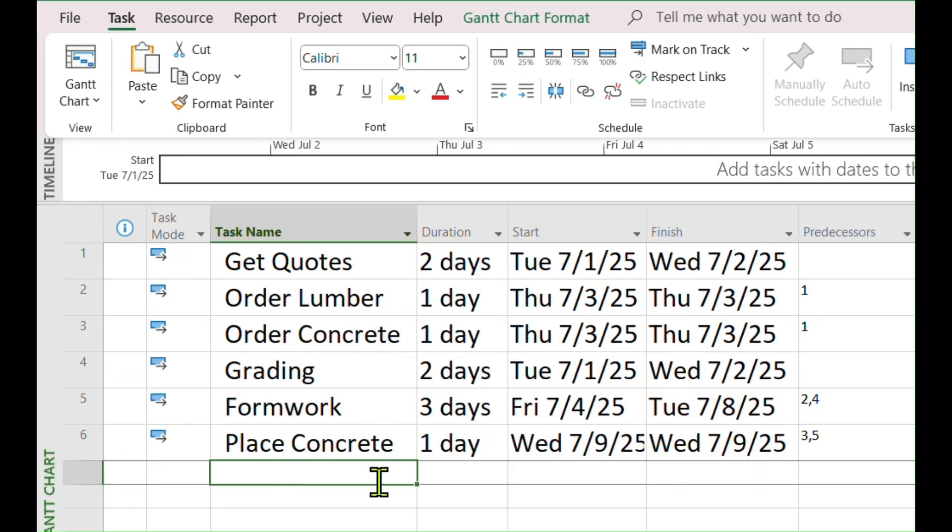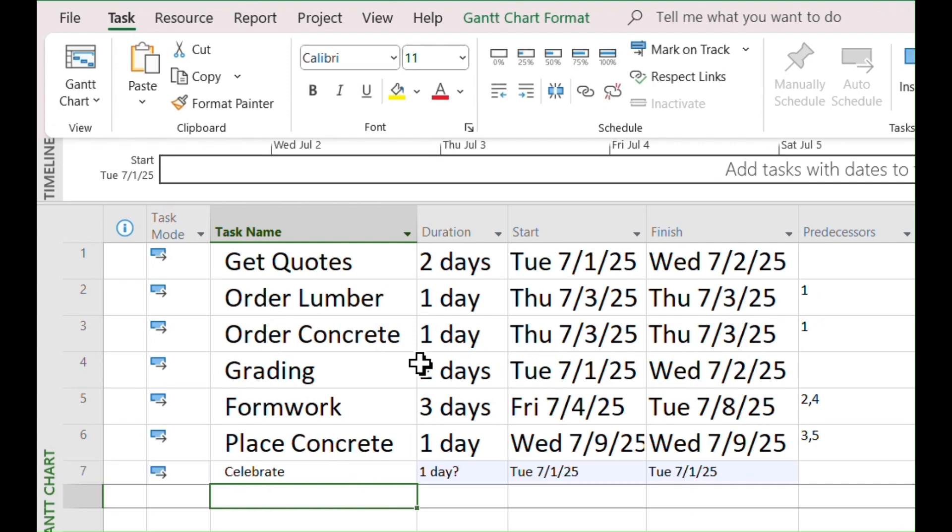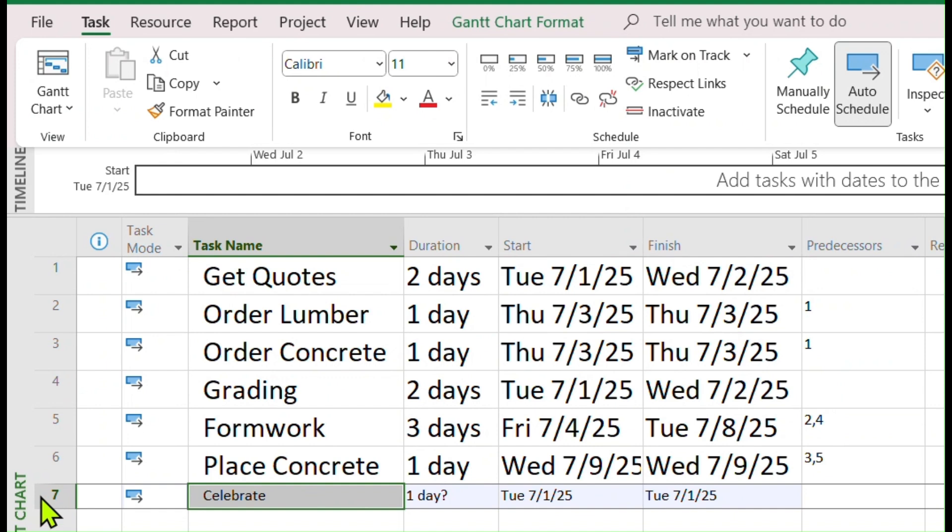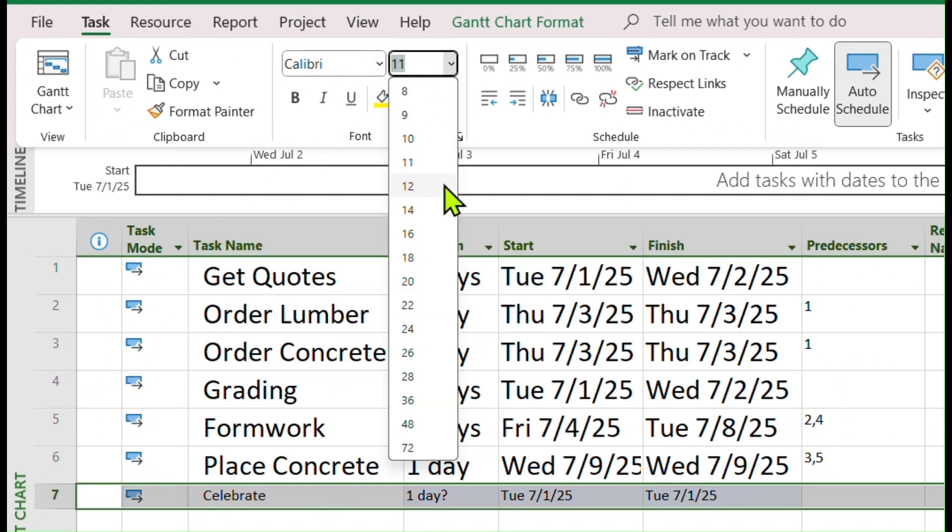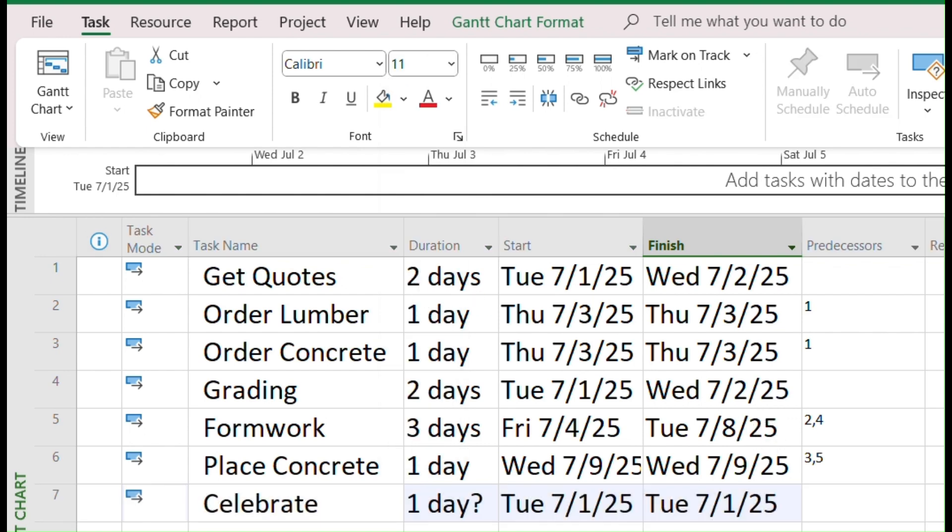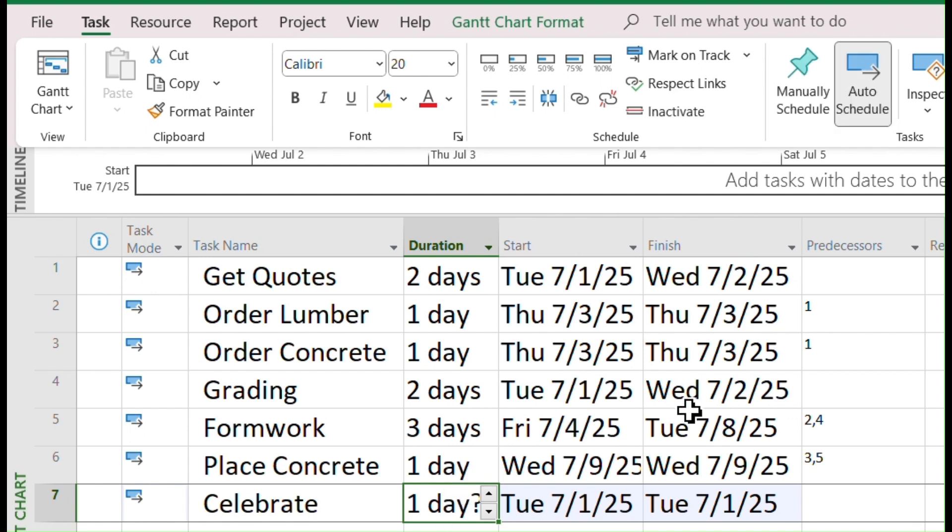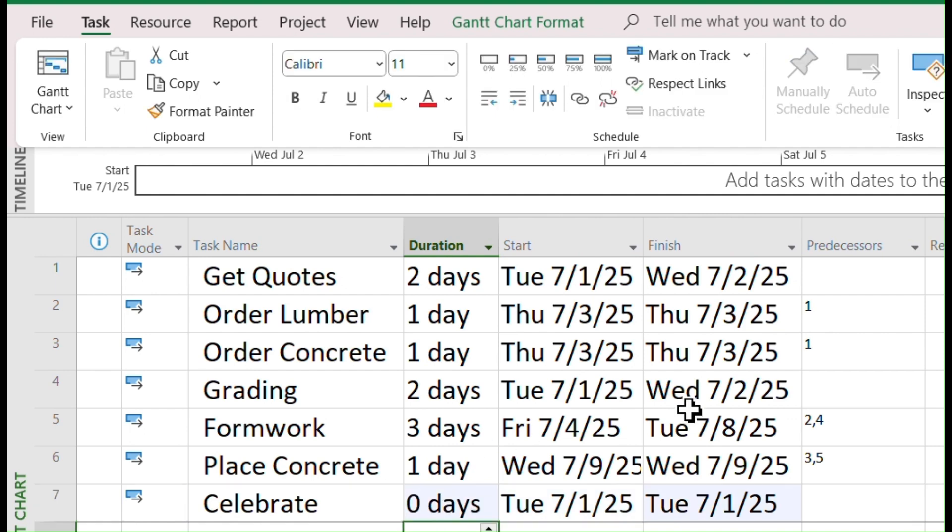We will add a new task. Go to the next new line after the last task we entered. Type, Celebrate. You can select the whole line and make the font bigger. But for its duration, this time, type 0, because milestones are just like flags and don't take time.